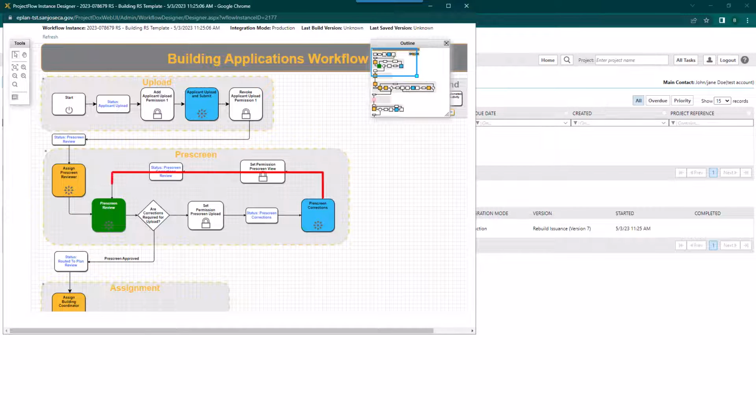Please note, prescreen stage in ProjectDox is similar to plan review activities, in that it may occur multiple cycles if comments are not fully addressed, or as long as submittal remains incomplete. However, procedures and steps demonstrated here would remain the same, regardless of number of cycles it may need to be repeated.